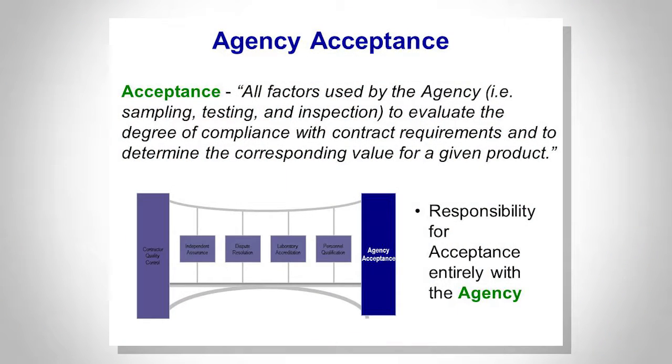As far as agency acceptance, this is for the state agency — that's you all. It covers all factors used by an agency to evaluate the degree of compliance with contract requirements for the product. There needs to be a firewall between the contractor's quality control people, staff, testing, and calibrated equipment, and your staff. Acceptance for the product is entirely up to the agency. The contractor can supply information, but you still have the final call — similar to environmental work, where a contractor can provide information or a study, but you need to validate it and formally accept it.